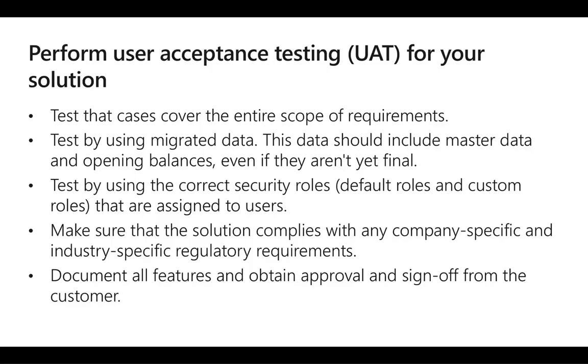Testers receive systems user training so that they are familiar with the user interface and the main functions of Dynamics 365 for Finance and Operations. They then follow a UAT script to step through all possible business scenarios related to a function or system area, and record test results.